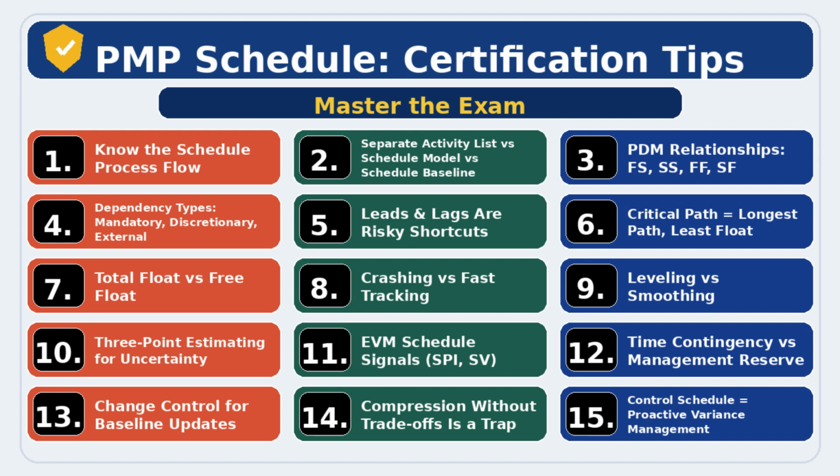You consumed free float. Crashing versus fast tracking. Crashing buys time with money. Fast tracking buys time with risk. Example of a scenario here. Deadline is fixed. Budget is flexible. In this situation, crashing will be the best option.